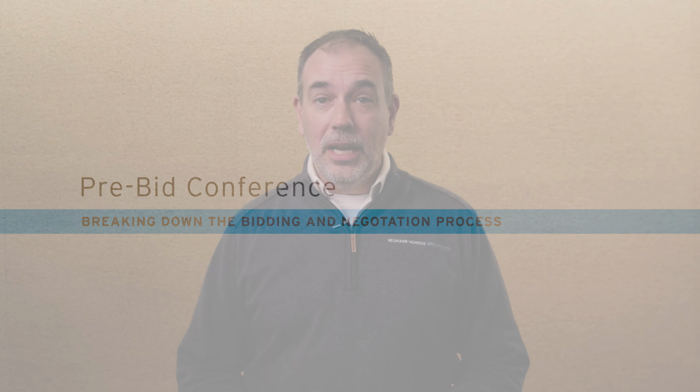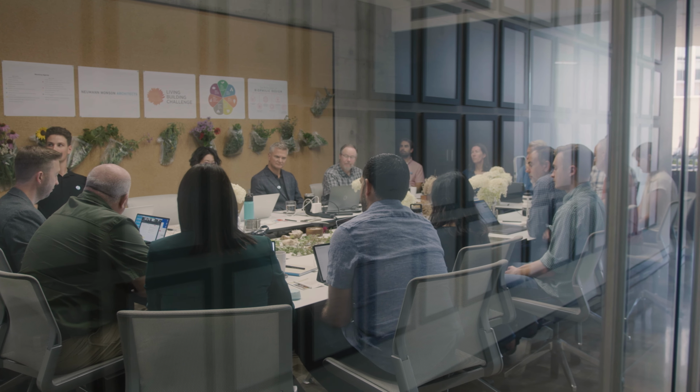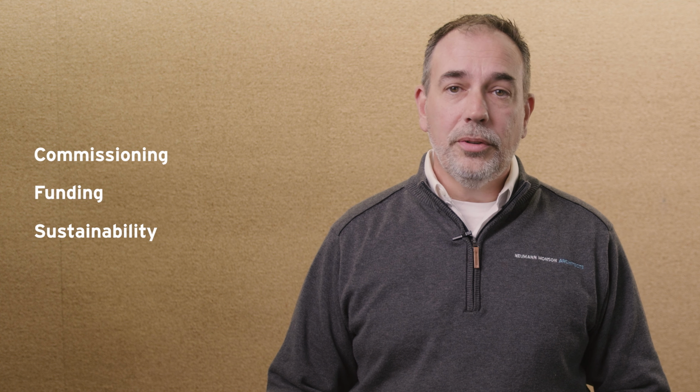After sending plan sets out to interested contractors, the first step of the bidding process is usually a pre-bid conference. Although a conference is not a requirement, we recommend hosting one to get everybody on the same page. During the conference, your architect will outline the instructions for submitting bids. Your architect will also review the project's requirements, especially those related to commissioning, funding, and sustainability. Ultimately, your architect should aim to create a fair and competitive bidding process and outline requirements to help prevent anyone from being disqualified on a technicality.